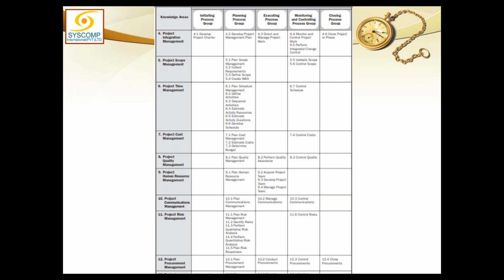So through change request, monitoring and control serves to replan those things. So although the replanning effort may not be as big as the initial planning effort, replanning will continue, will go on, and every time replanning will result in an updated project management plan. And that updated project management plan will be sent back to execution for execution purposes. And that cycle will continue until and unless all the requirements of the project have been met. And only then can we close. Okay, sir. Thank you.